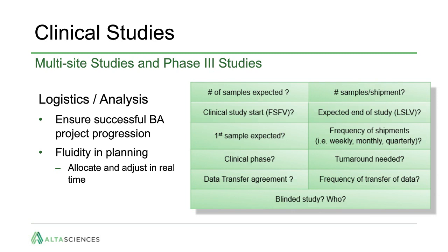Setting an initial baseline for allocation of resources and planning is very beneficial. Of course, there is fluidity, and once the base is set, it can be adjusted in real time. Speaking from a perspective of a CRO, it is better to plan tentatively and have slippage out or cancellation for planned sample analysis rather than triage it in unexpectedly. Of course, urgent bioanalysis due to adverse events or other reasons always has priority, and my comments are more for routine analysis.